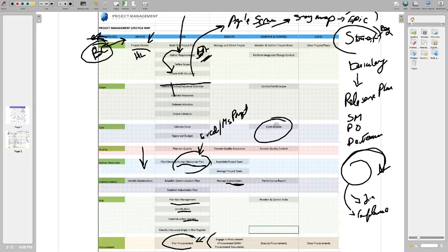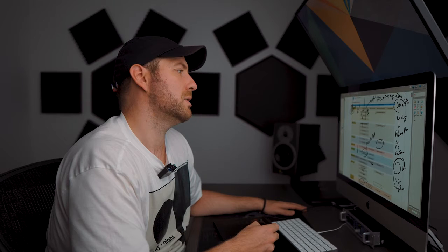Controlling costs, when we come to monitoring and controlling, you're monitoring costs, for example, every month there needs to be an amalgamation of forecasts up ahead of how much each team has burned. Let's say you've got 10 teams, so you've got to report on these things. And you would probably do it in a traditional way, where you would communicate via email to the leads, or maybe the senior managers, and try and get feedback on their burn or the burn of their team. And so you report that back to finance. So that would be kind of a traditional waterfallish approach to managing costs.